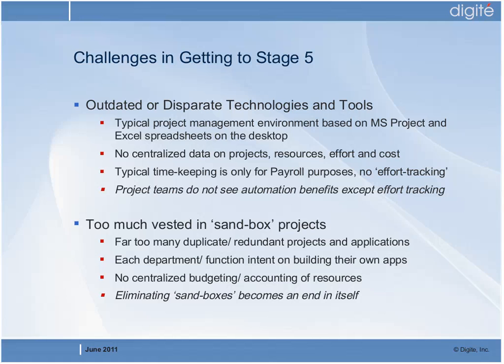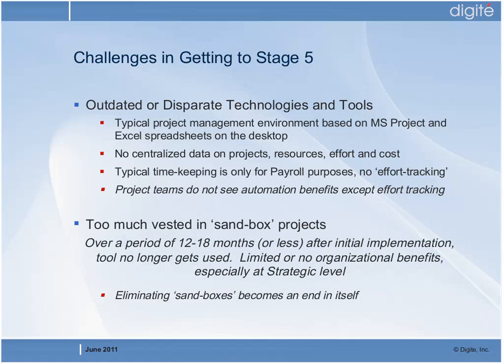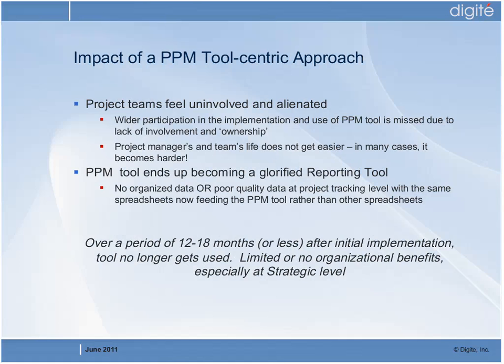First of all, eliminating sandboxes so that you now have an organizational view of overall projects and overall resources, and that detracts from the implementation of the PPM tool. And finally, as I said earlier, there is a complete lack of involvement from the project team, and the PPM tool essentially becomes a glorified reporting tool. Over a period of maybe 12 to 18 months, the overall usage of the PPM tool drops off. People say, hey, this is not really for us, it is really only a management tool, and there is really no organizational or strategic benefit that is achieved through implementation of such a strategic tool.